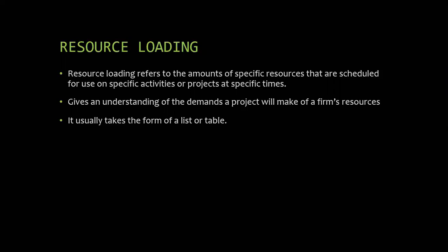That time has passed. If that machine is called too early, at the time of foundation work, the specific activity, the specific time, has not yet arrived, and it causes some delay. So early requirement is also not required. Late requirement or late arrival is also not required if I am talking about that machine.